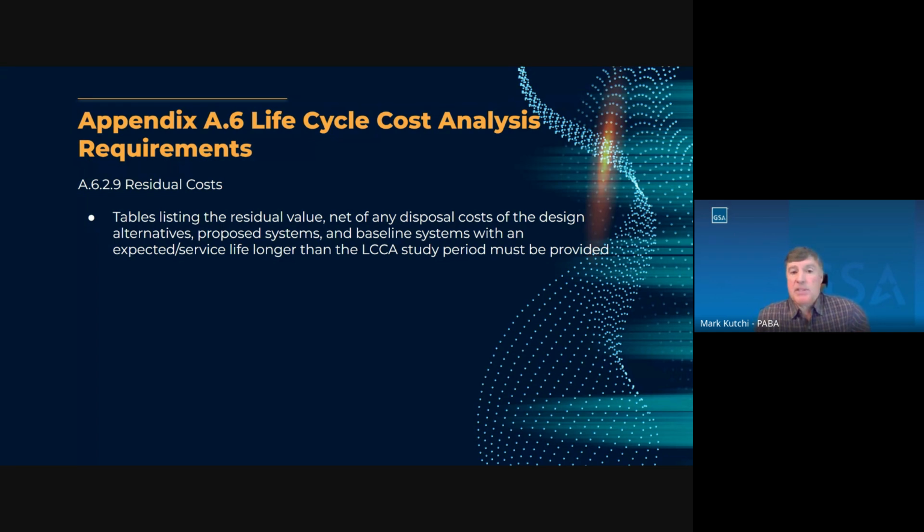Residual costs: tables listing the residual value, net any disposal cost, of the design alternatives, proposed system, and baseline system should be included. I typically don't see residual costs included in life cycle cost analysis, but it's something that should be considered.